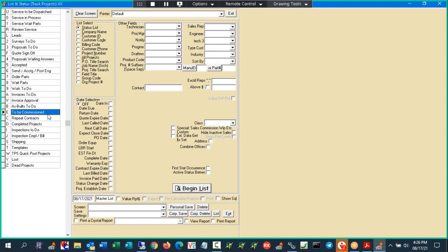The invoices don't come in for 2 weeks. So there's a time period between when the job is done and shipping costs or whatever come in. So we don't do the commissioning the moment we've done the bill. We do the commissioning 2 weeks later, or whatever your time frame is.